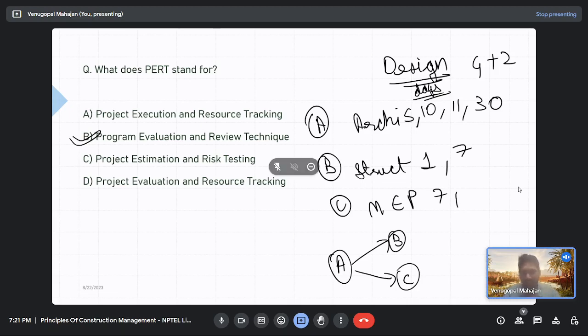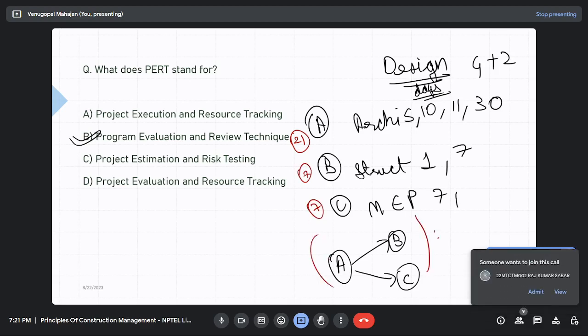See, from your experience you can say that there have been a lot of projects that I have dealt with, but on an average, in 3 weeks my architectural design is complete, structural design 1 week, and MEP 1 week. So you can say that in 1 month my whole design process will complete, right? On an average, yes, sir.